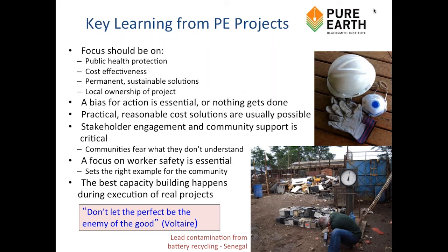We do find a problem sometimes where the standard of the country has been set so low, they might set something like 30 milligrams per kilogram, that it's impractical to reach it. That presents a problem, and it requires a lot of discussion. Generally, we find that we can reach some sort of compromise. But in particular, if you're using the encapsulation in place strategy, you're going to cover this material anyway. You're not removing it.